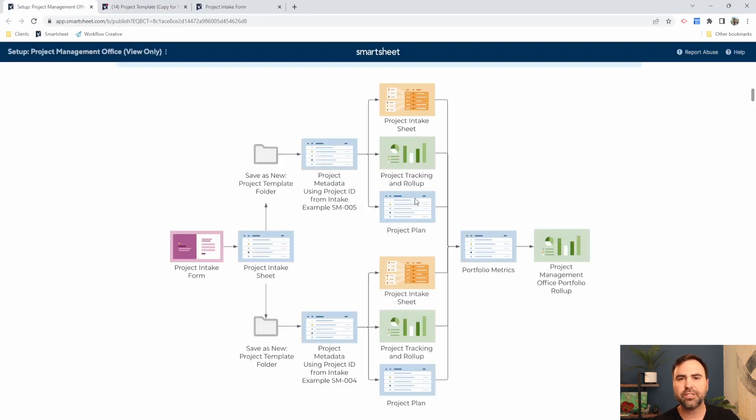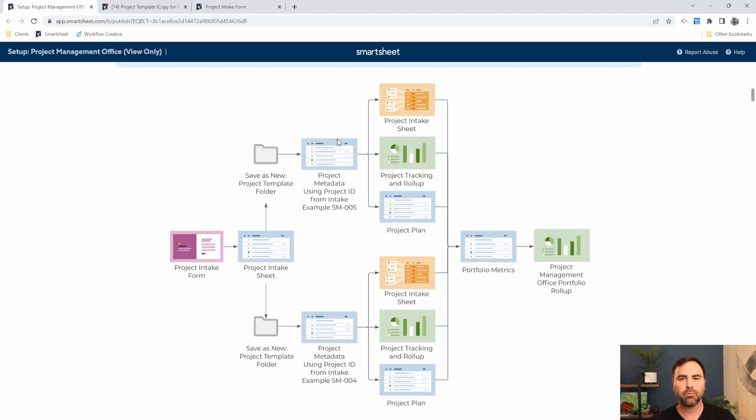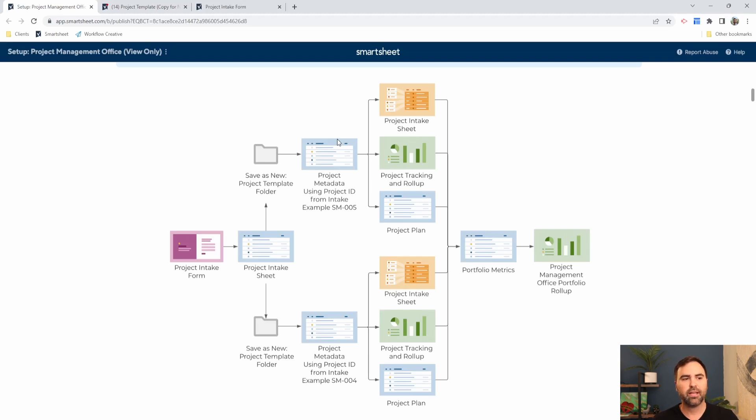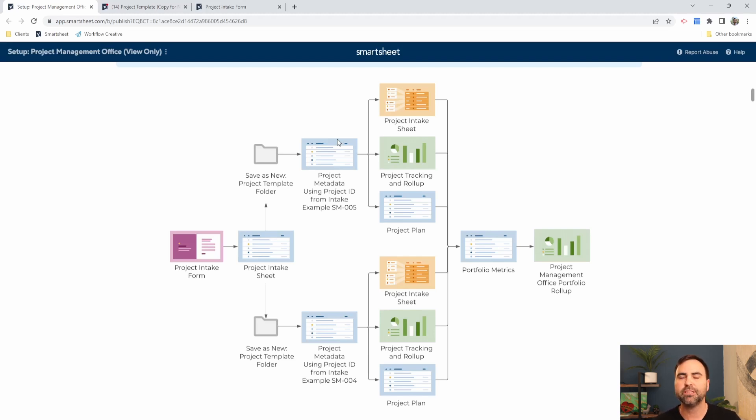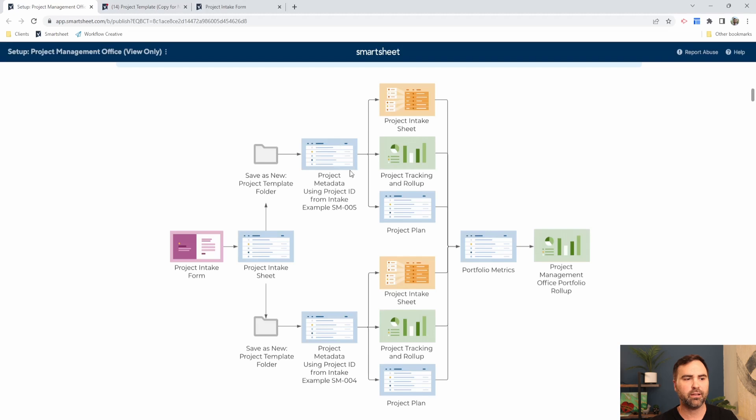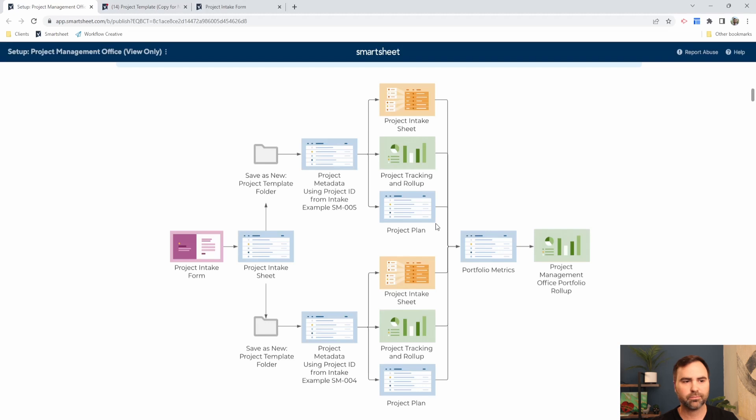We've talked about the sheet associated with our project plan. There's an additional sheet in here called our project metadata. Our project metadata sheet is used to perform calculations on our project plan and it's also used to store data about our project. Really high level information like my project plan name, my project number, my project start and end dates. This is all information that's very high level about a project. That way, if I have multiple sheets within my project, like a RAID log or a weekly notes log, then I can use data from my metadata sheet and send that data to each one of those individual sheets in Smartsheet for that project.